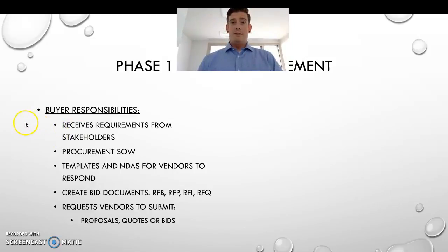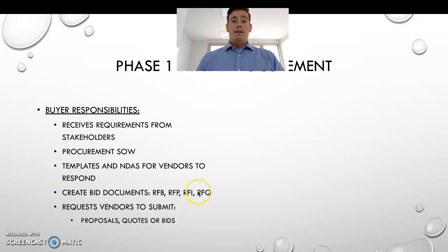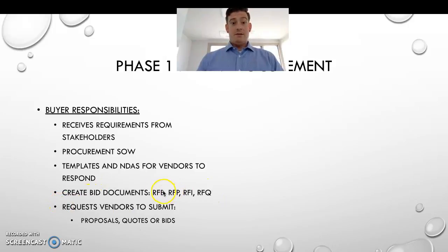They also need to create bid documents such as a request for bid, request for proposals, request for intents, and request for quote (RFQ). Once these are all created and selected, you need to send them out to the vendors to get results back.